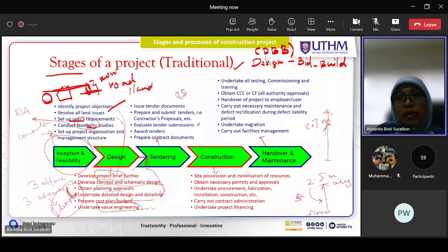Normally, at the very beginning, for example, 11 contractors join the tender. After evaluation, the QS will do certain analysis. They will look into the financial capacity, the technicals, and the project durations. There are many things they need to evaluate in the tender.